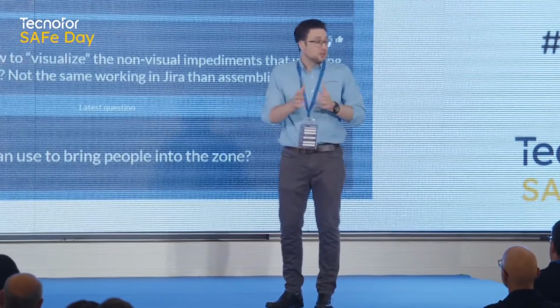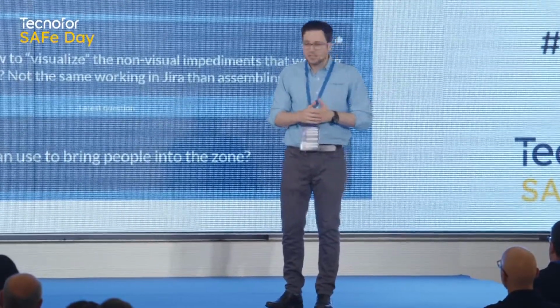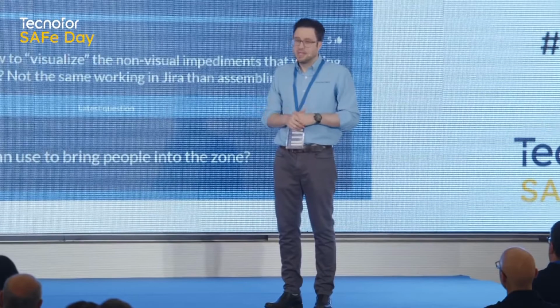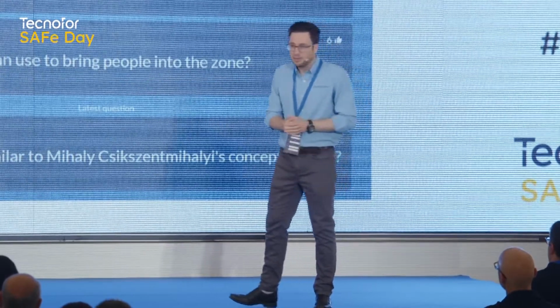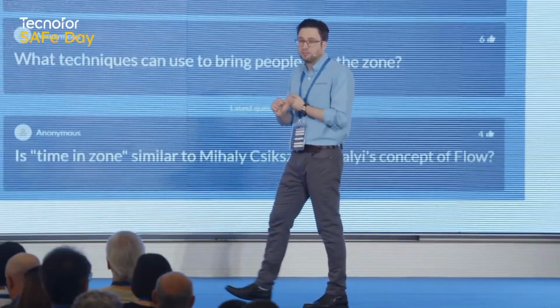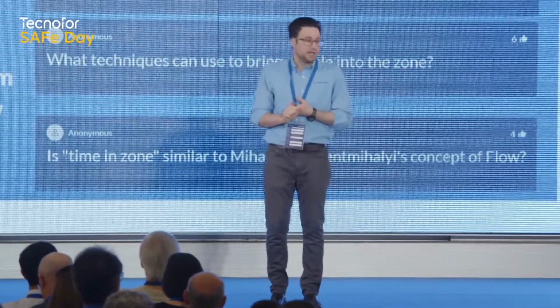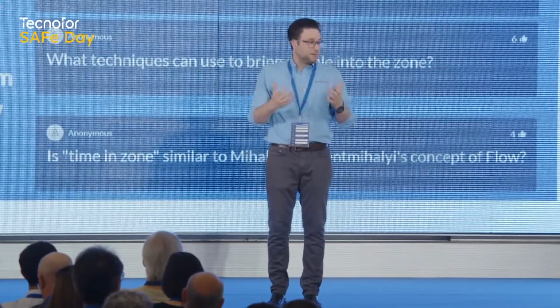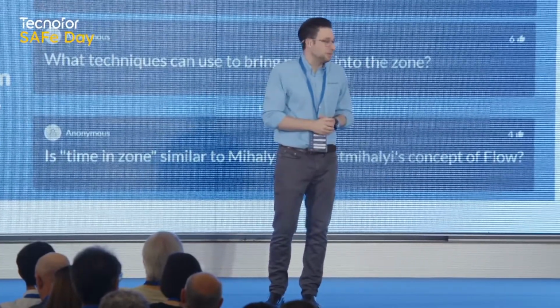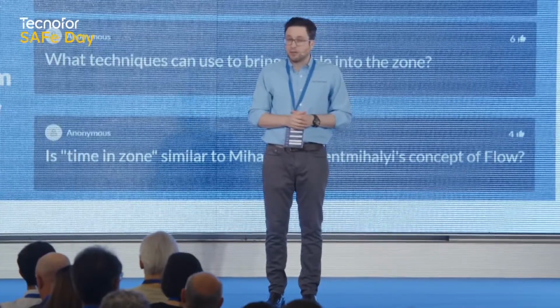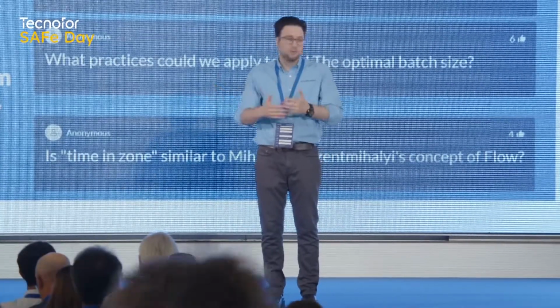But the honest answer is that it's trial and error. Batches will occur in lots of different ways, and different batch sizes need to be applied depending on what batch we're talking about. So a customer feedback batch: do we want to speak to the customer every day? Probably not. We probably don't have enough new work to show them. Maybe once a month is enough. If we find that we're not building the right thing and we're deviating from their needs, we make it every 2 weeks.